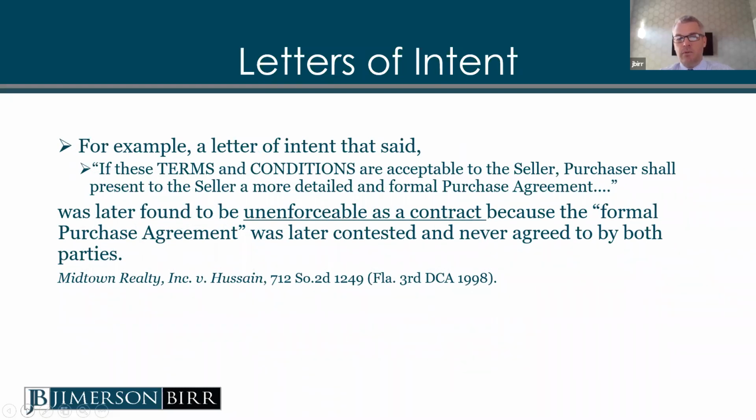This is just an example of one case in Florida, a case that was decided in 1998, where there was a letter of intent, and it basically said these terms and conditions are acceptable, but they will present a more detailed and formal purchase agreement later on. That formal purchase agreement was later contested, the letter of intent was contested, and the court found that because the parties agreed they would later agree to more specific terms, it wasn't an enforceable contract.